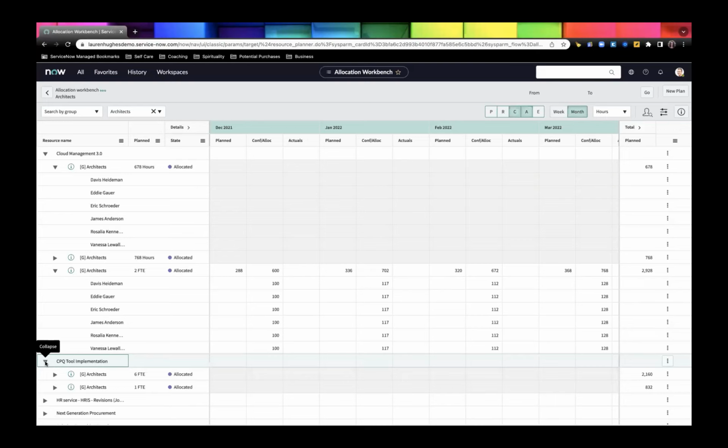Sorry, Lauren. We do have one about the resource rate changing after a resource plan is allocated. Will it affect the cost of previously created records? So there is an allocation and then there is a cost. We have that allocation plan at a specific rate, but when the time card comes in, that's where the cost is. So all the line item time cards that are billed against a project before a rate changes are going to stay the same when they're complete, but any new time card entries are going to use the newer rate.